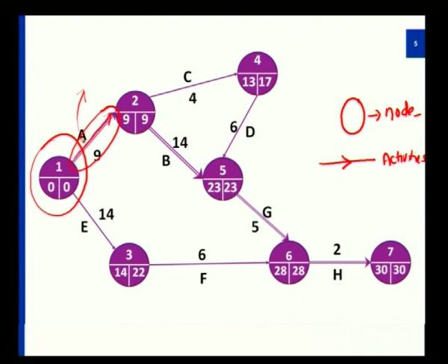By my understanding of the previous table, A and E are two different activities which don't have any prerequisite. So I start with A here, and I end up somewhere after some point in time. I am not considering any time at all, and at the same time I can even start with E. It need not end at the same time as A, but at a different time. So E also takes some particular time and it flows through the other path in the diagram.